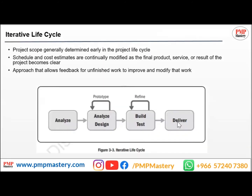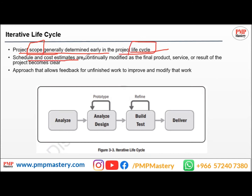Another development approach is the iterative life cycle. In this approach, the project scope is generally determined early in the project life cycle — for example, the overall scope for developing a car is defined at the beginning. However, the schedule and cost estimates are continually modified as the final product, service, or result of the project becomes clear.